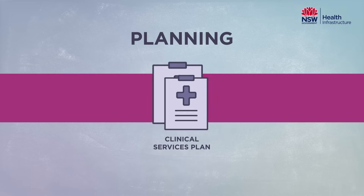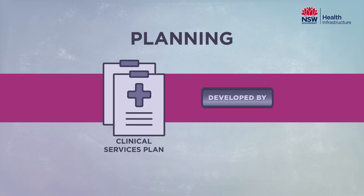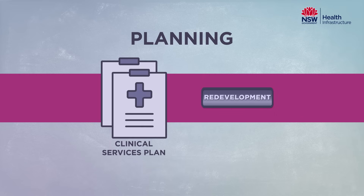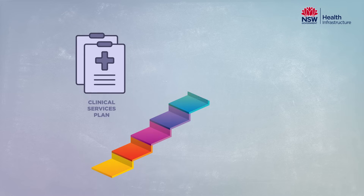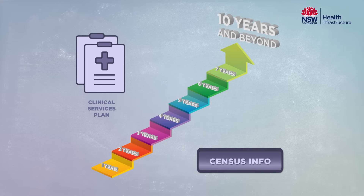To kick off the planning process, we examine the Clinical Services Plan. Developed by the local health district, the Clinical Services Plan forms the foundation for our planning of the redevelopment. The Clinical Services Plan looks at least 10 years into the future using current health data, census information and projections of future local needs.